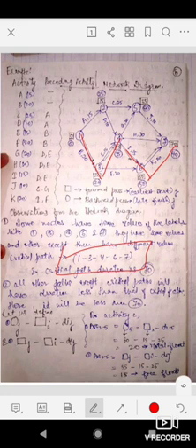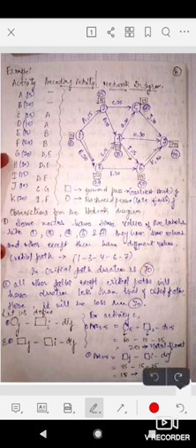All the other paths except this path will take time less than or equal to 70, because those are not critical paths. For example, if you find this one, 1, 2, 4, 5 and 7, this is a non-critical path. It will take time less than or equal to 70. 1, 2, 4 and 7 is also a non-critical path. So we have only one critical path here. We can have more than one critical path, but here the critical path is 1, 3, 4, 6, 7.